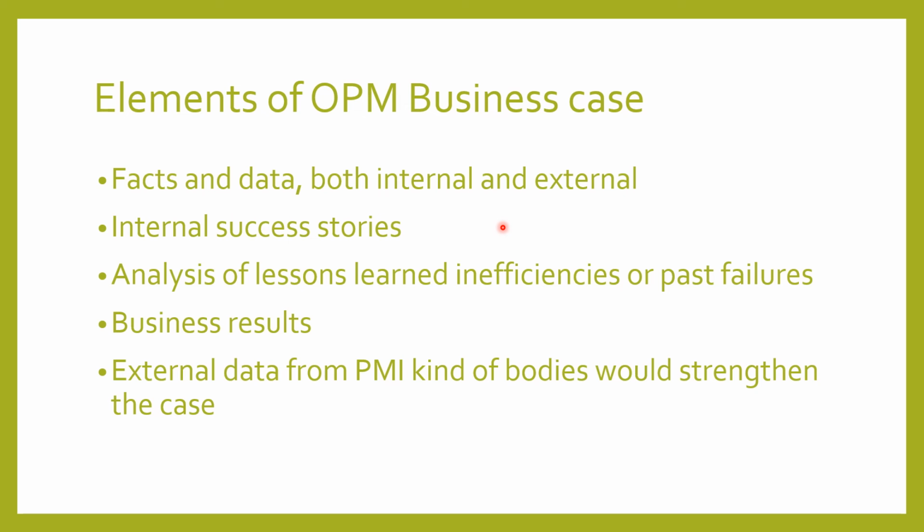Internal success stories: when it comes to internal, you can refer to your internal success stories. You can refer to your failures, analysis of lessons learned, inefficiencies of past failures, right? All those things you can refer to. You can include the business results in the business case, and also you can augment external data, right? To strengthen the OPM business case, you can get the data from bodies like PMI, where you can talk about what is the return on investment by establishing an OPM, how structuring it, the processes, strengthening the processes and tools and everything. That kind of external data will also help strengthen the business case.